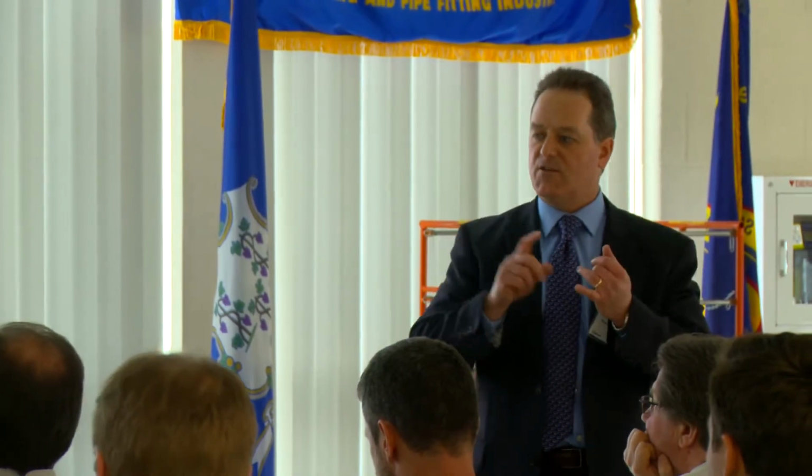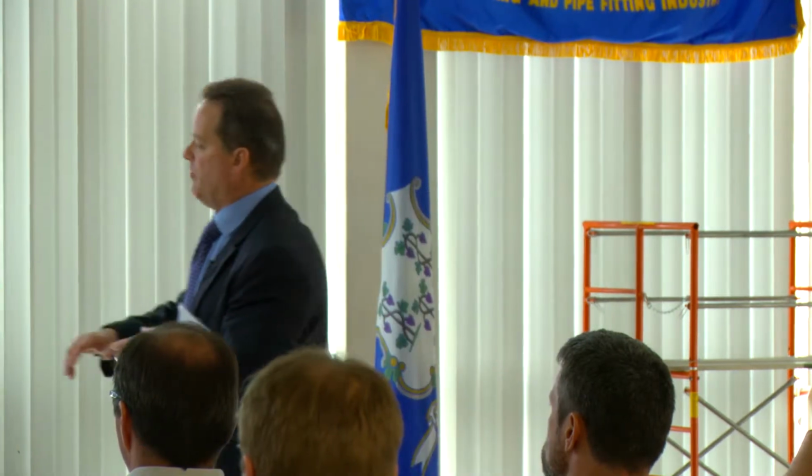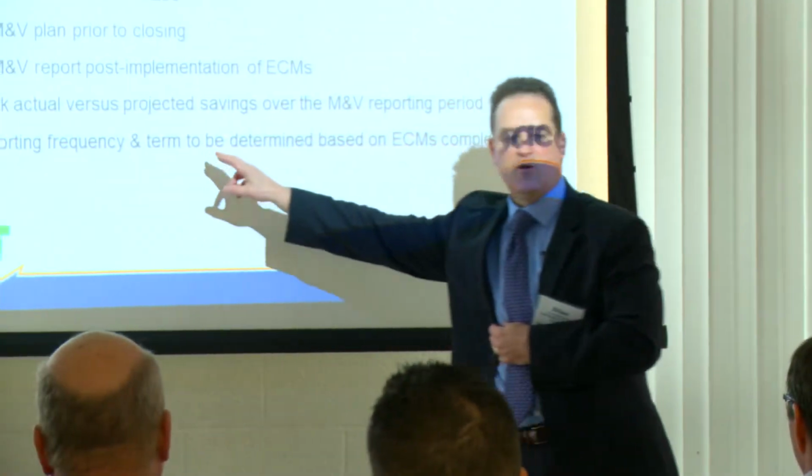Relative to the M&V, again, the general logic there is the M&V term and frequency of reporting will likely change on a project-by-project basis on the logic of, what are the complications of this particular project, what's the risk of underperformance that the stakeholders view, and a term and a frequency will be agreed to.